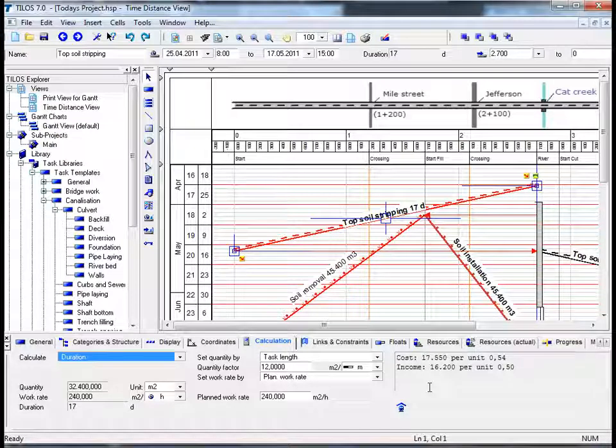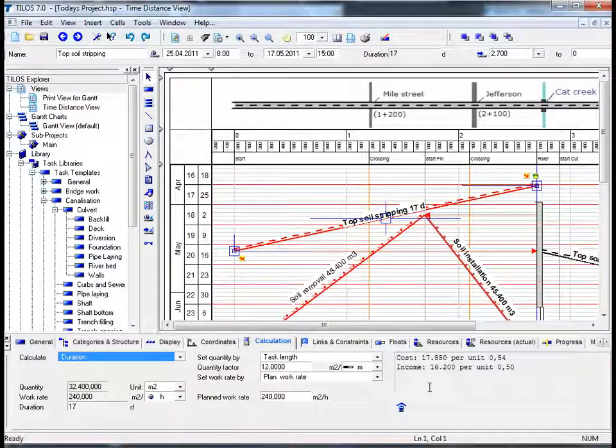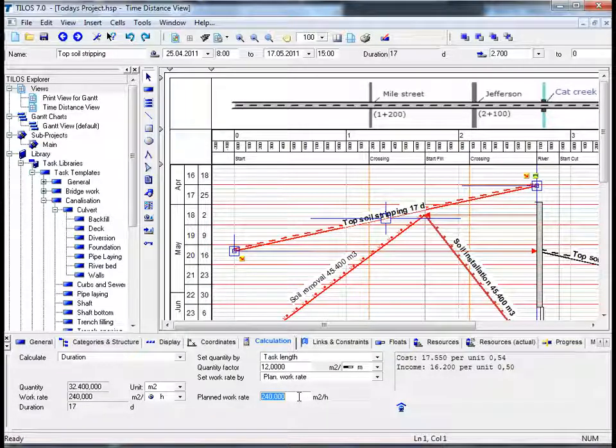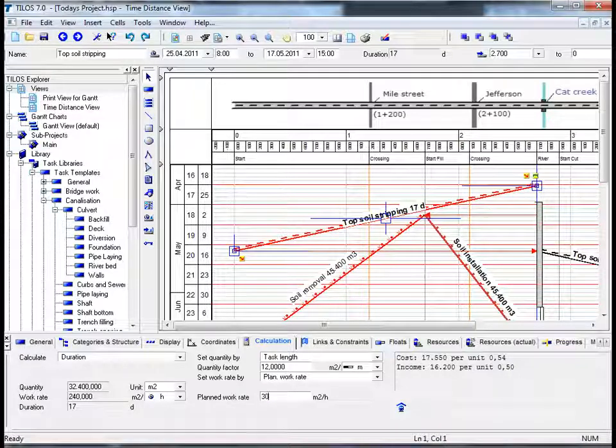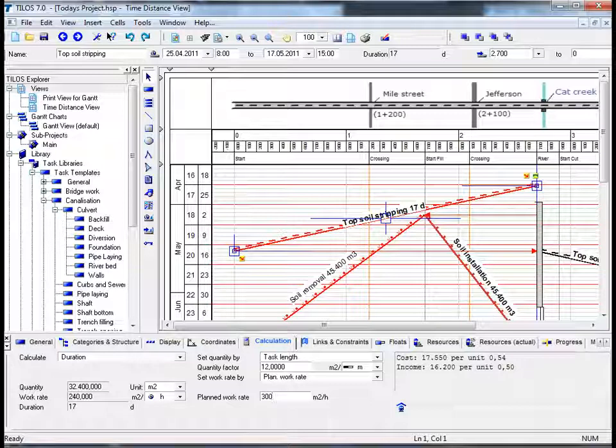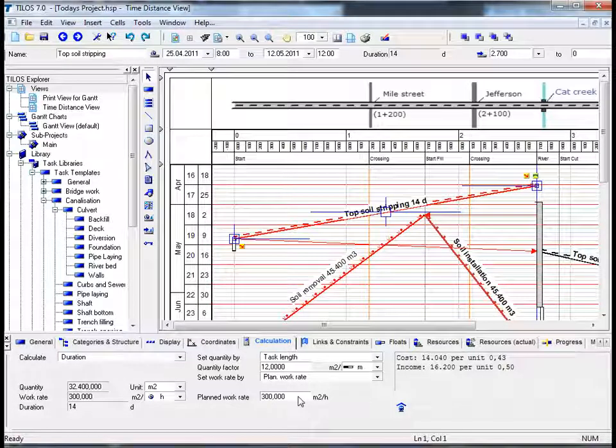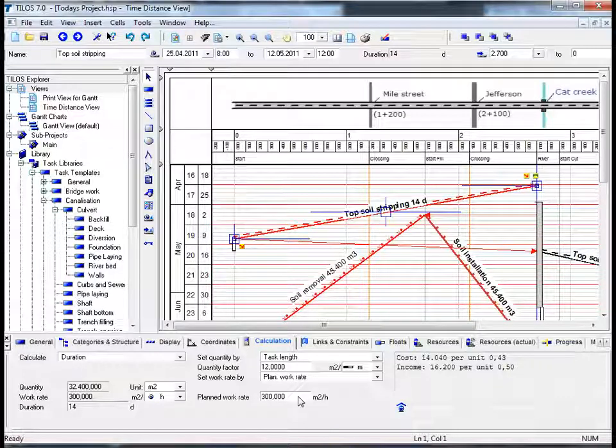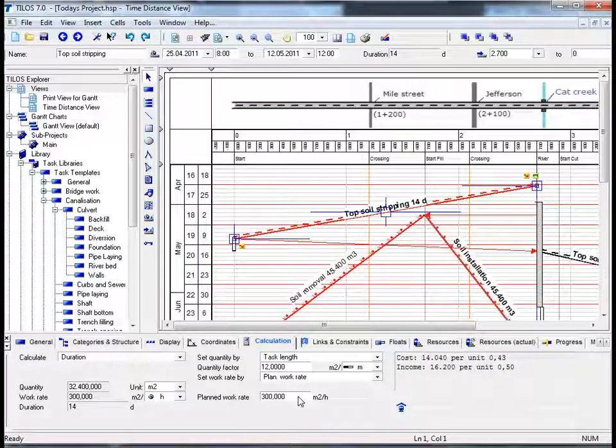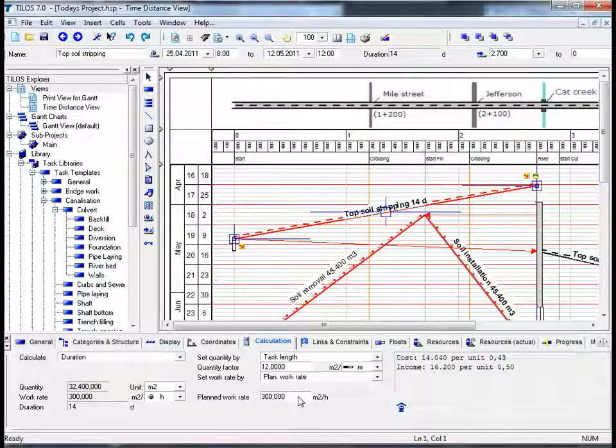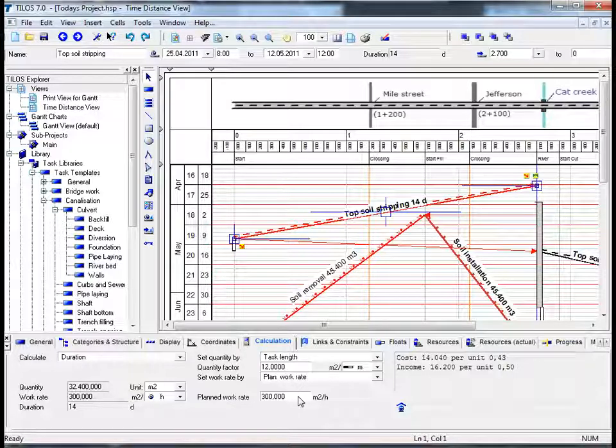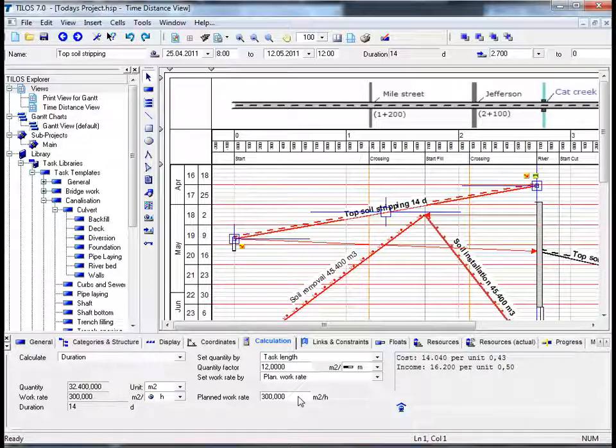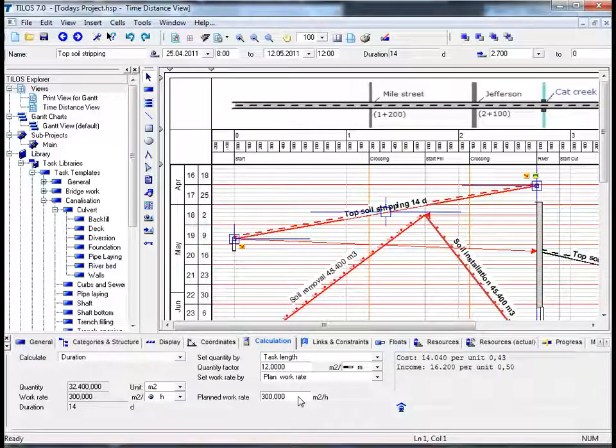What do we need to do to earn money as opposed to losing money? If we go to the planned work rate field and change this to 300 square meters per hour and hit the return button, we can now see that we have a different cost structure. Our income remains the same, however instead of losing money as we were a moment ago, 1,350 euros to be exact, we are now making money based on this calculation model.